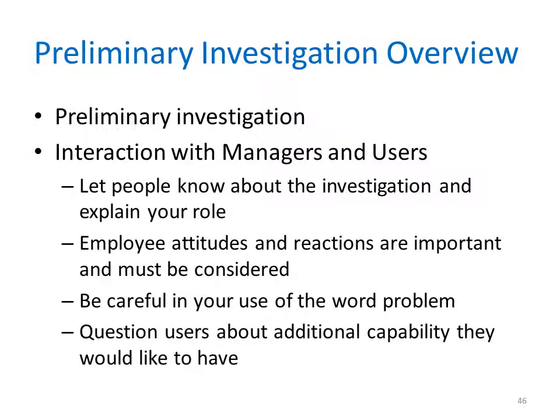A systems analyst conducts a preliminary investigation to study the system's request and recommend some specific action. After obtaining an authorization to proceed, the analyst interacts with the managers and users. The analyst gathers facts about the problem or opportunity, project scope and constraints, project benefits, and the estimated development time and costs. The end product of the preliminary investigation is a report to management.